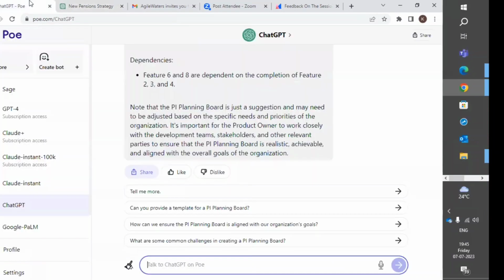But there are tools, I feel, where you can generate a particular prompt checklist or prompt template or prompt synopsis, and you just run it through the next PI and it gives it back to you. But the interesting thing here is that to generate the next PI outcome or PI details from GPT, the input from program increment one is required. So you have to link the outcomes, and based on that, you ask it for PI 2, so that the linkage is there between two program increments.